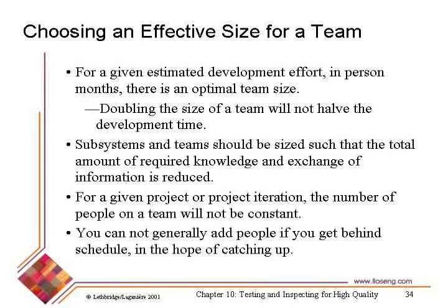It just won't happen. It might still take you 3 months. And now you've got 6 people working for 3 months, so you've doubled your costs without halving your time. Okay, it might take you slightly less. It might take you 2 months. But you're not going to necessarily get back the total amount. You're not going to get the thing done in half the time.